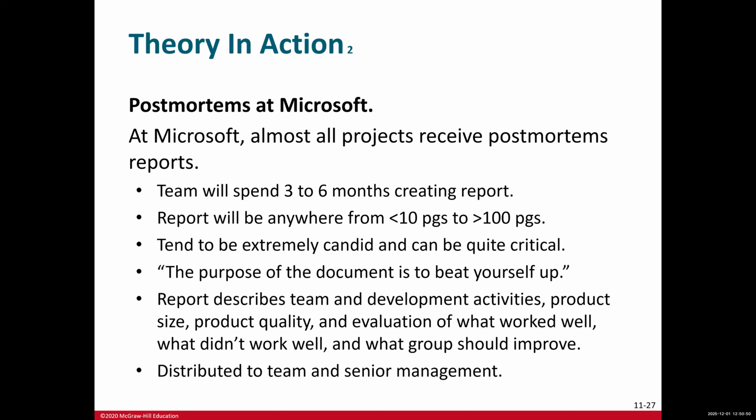It's a very well-known process, a reflective process that occurs after the project has been completed, especially after a project or system has launched. So in a post-mortem, we get together to analyze the successes and failures of the project, identify all the lessons learned, and then provide actionable insight for future projects.